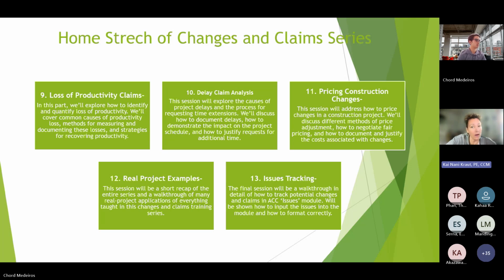So, up to you, but we are not paying delay for you, we're not paying for remobilization for you to come back to the site, and we're not counting this as delay. So we did the field order, we did the memo, and then we did a change order to create the force account item. So the disagreement really was in the field. Again, when you're in a force account situation, we can direct means and methods. In this case, we were moving a water line, and I know we're out of time, so people can jump. I'll just finish explaining this.